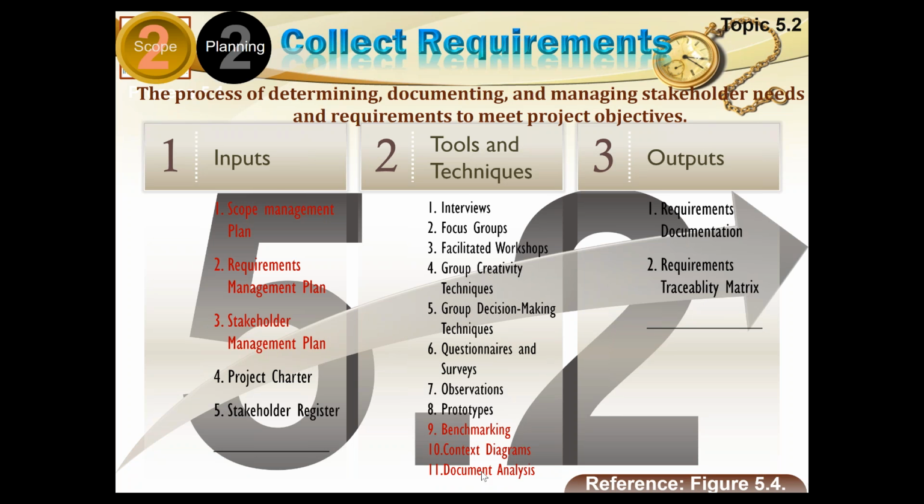Now look at the tools and techniques which we require to use for establishing these requirements. And there are a number of tools here, a huge list, but this is otherwise very natural. If you are collecting the data from a select group of people only, say you have about 6 people from whom you have to collect this data, you are very clear about it, you know that there are the senior executives and they know everything and they will tell me all the details, then interviewing is a very good mechanism where I can fix a time and go to each and every one of those 6 executives and talk to them. I have prepared questions, I discuss with them.